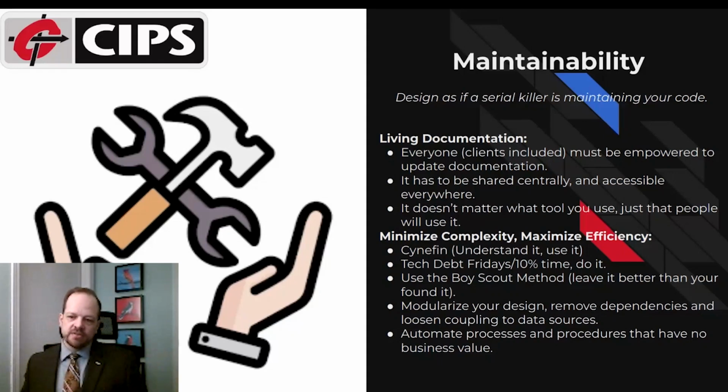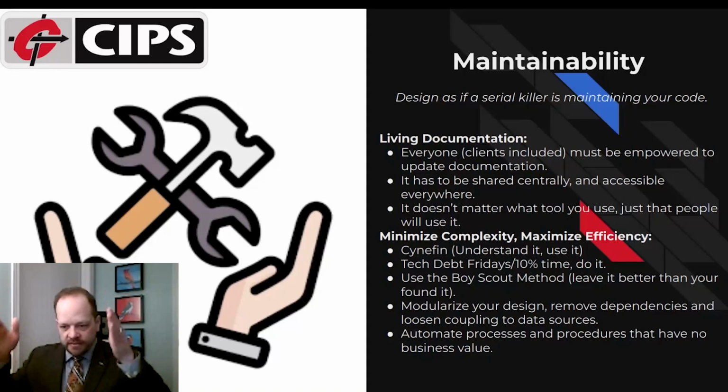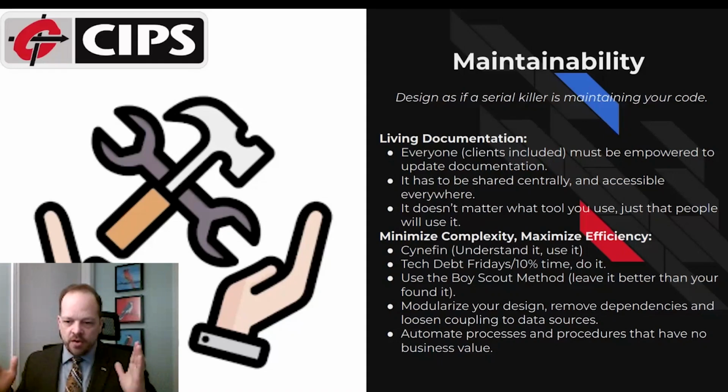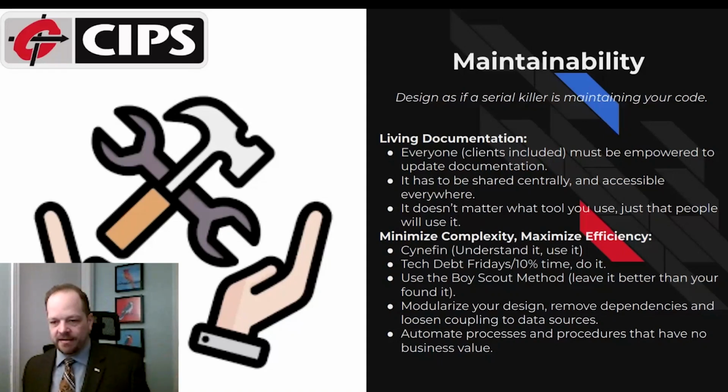Essentially, for every person that's maintaining your system, you dedicate a specific slice of their time per week, per pay period, and say you cannot schedule any meetings or any deadlines within this slot. Within that slot, the individuals have free rein to go into the tech debt backlog, pull an item from random from there, and get it done.